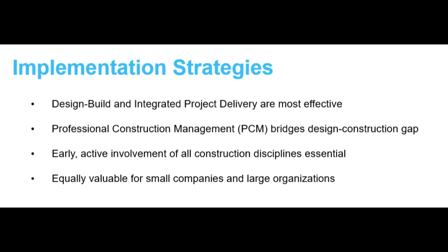All stakeholders, meaning contractor, client, engineers, supervisors, designers, planners, all workers, share risk and rewards equally. The next one is professional construction management, which bridges the design construction gap. That is a very important strategy. Early contractor involvement: contractor advises during design phases.